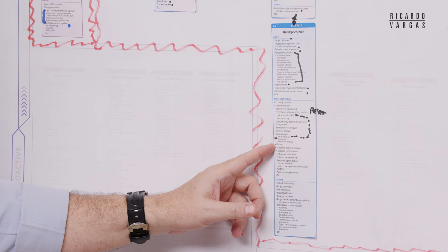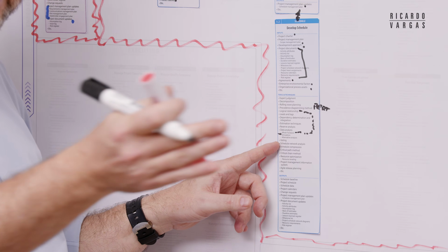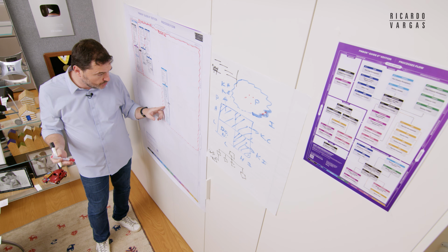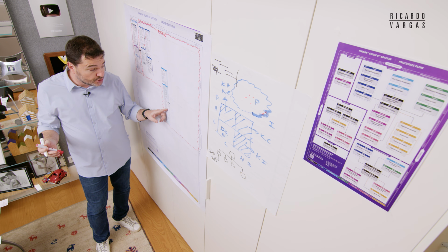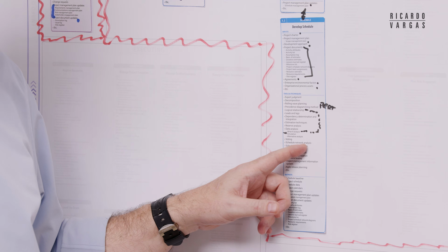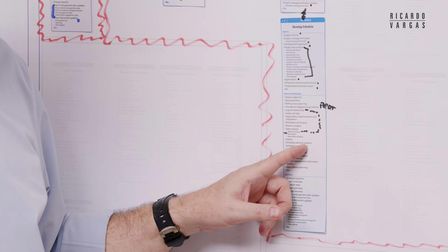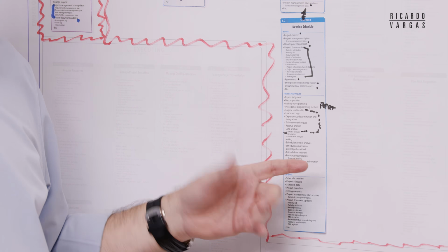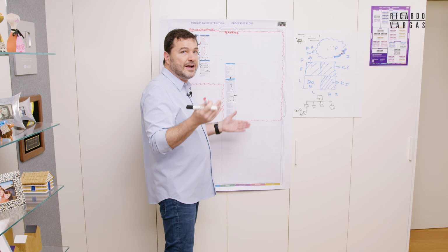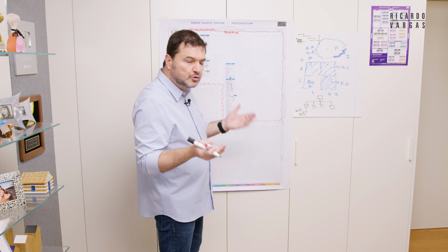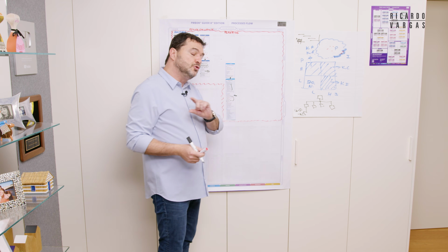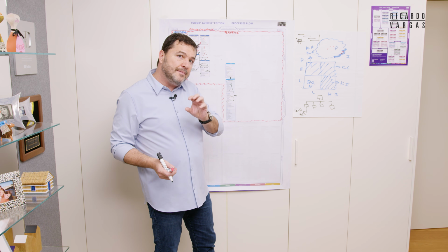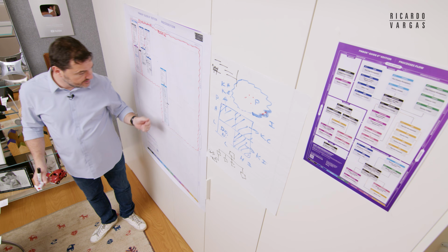Voting, okay? Who supports 10 days, 8 days? It's not very usual, but people can do it. Schedule network analysis. So you analyze the network to see the weak links, and then you try to protect these weak links. Critical path method, the CPM method, is very close. This is why we used to call it PERT CPM in the past. The critical path: you do the forward pass, the backward pass, and you calculate in terms of time which tasks are the critical ones.